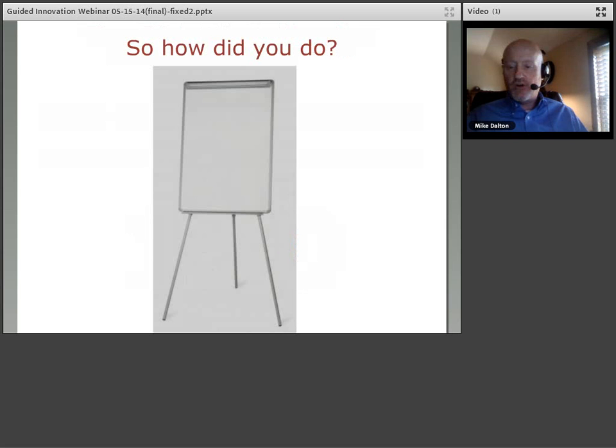And what was really happening was that the more projects you take on, the multitasking overhead, all the interruptions that you were having, they double the amount of effort required because of those switching costs and the multitasking overhead. And this chart really shows what's happening there. This is a study of engineers showing the percentage of value-added work goes down the more projects they're trying to juggle or the more plates they're trying to keep spinning at the same time.